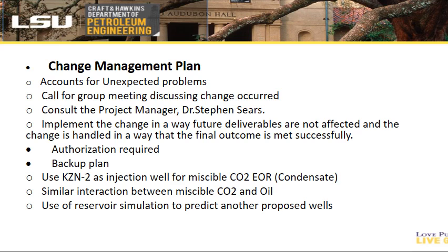In case we face a change in management plan due to unexpected problems, the following steps are considered. First, a call for group meeting to discuss that change. Second, consult the project manager, Dr. Stephen Sears. Third, implement the change in a way that the future deliverables are not affected and the change is handled in a way that the final outcome is met successfully. Finally, an authorization from the project manager is required before any change is implemented. In case we face a difficulty to finish this project, a backup plan is to use Khazan 2 well as an injection well for miscible CO2 EOR.